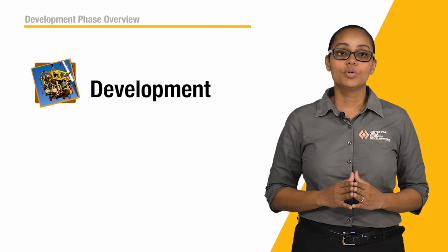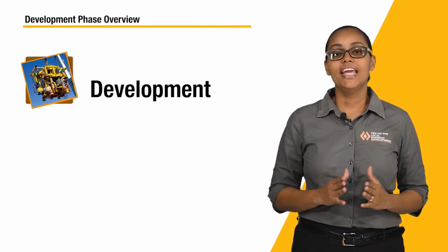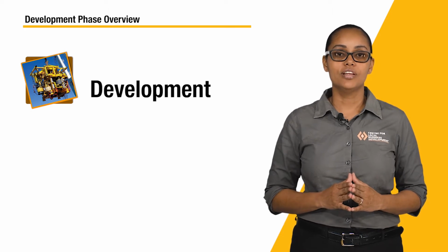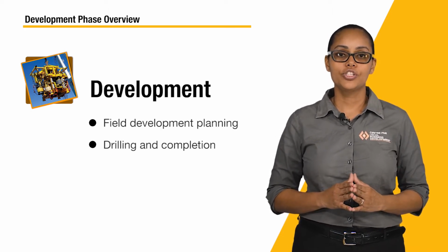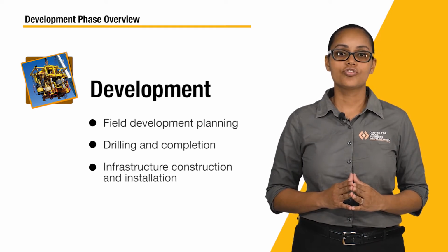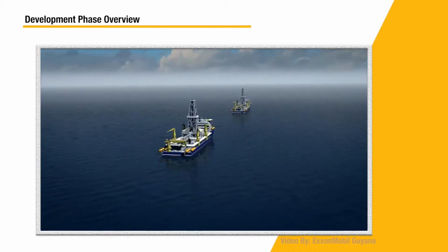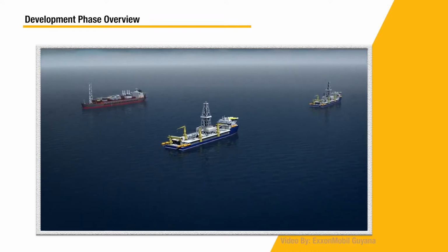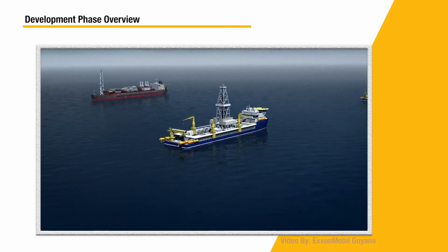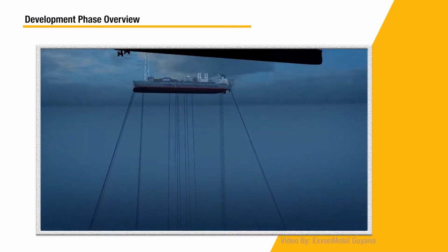This stage presents the greatest opportunity for local content. The key activities in this phase involve field development planning, drilling and completion, infrastructure, construction, and installation. Development requires extensive analysis and planning to guide crucial decisions regarding the number and design of production wells and the type and conformation of surface and subsurface facilities.